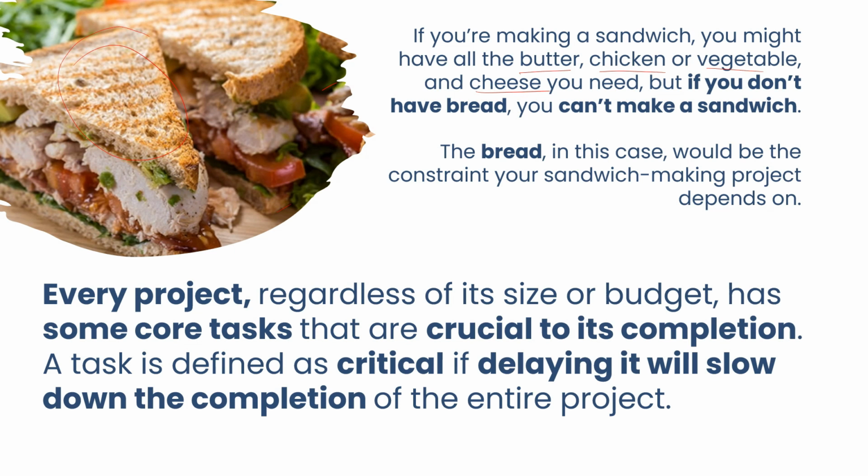Similarly, in a real world project, there are some key activities associated with every project which have to be completed. You need to identify what those critical activities are and what the duration of those activities is, and those are the activities which fall on the longest sequence or longest duration path of the project. And this is what CPM does in an analytical way, to understand what those activities are, what their duration is, and how much time is going to be taken, right?